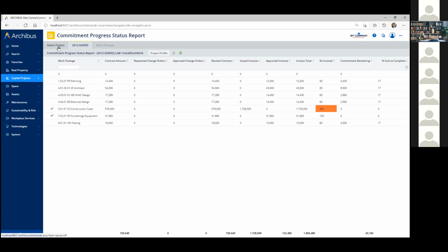And now you can start seeing how Archibus begins to organize projects. Each project within Archibus is organized by what we call work packages or design packages, or just administrative tasks that have to be grouped together or within a particular time frame. A lot of these might represent individual phases. In some cases, they'll represent contracts that you have with your clients.